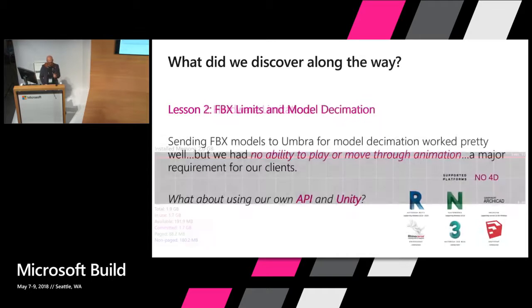through the device manager. Next thing you can try is FBX, and we tried using tools like Umbra and Simplygon to basically take snapshots from our model at different critical moments in the timeline, beginning, middle, end, or any milestone date the customer wanted, and we would push that up to the cloud, decimate the models, bring them back down, and then create this app experience for the customer. The problem with that is it was just not a scalable solution for our customer base. We couldn't expect customers to just keep exporting FBX after FBX.